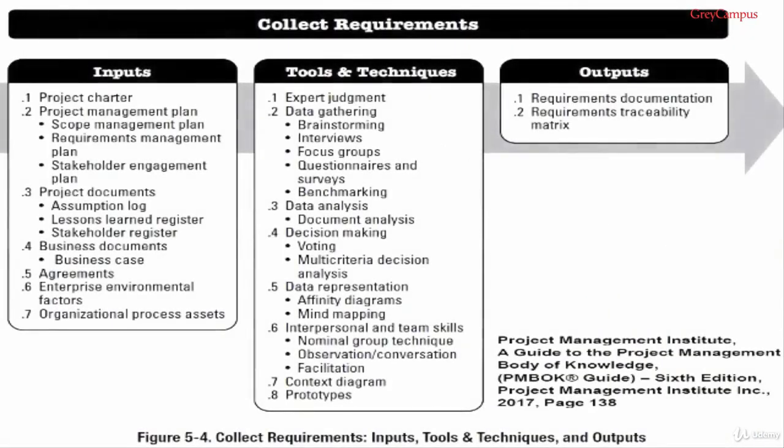For example, a requirement for a service to be more efficient or to solve more problems in less time. These are meaningless because you can't measure the change, and so it's impossible to objectively determine if the project was a success. An objective measurement may be average time for service desk to solve issues reduced by 4%. Average issues solved per week increased by 9% on the same week 1 year ago. These can be measured, and so you can tell if the requirements have been missed, met or exceeded. The inputs, tools and techniques and outputs for the collect requirements process are shown in figure 5.4.